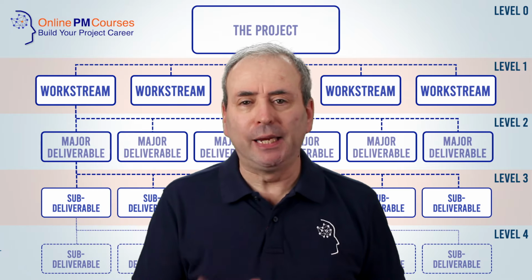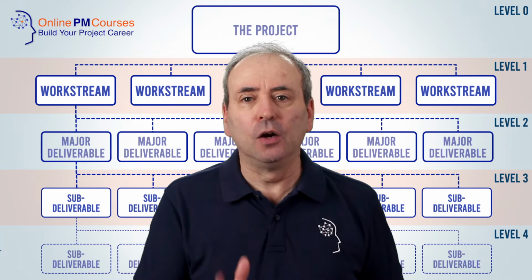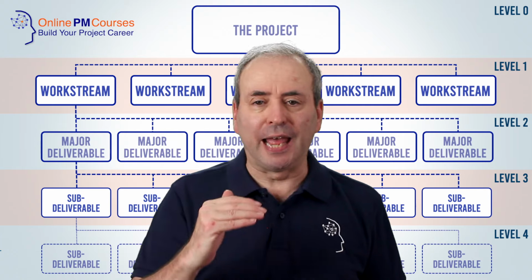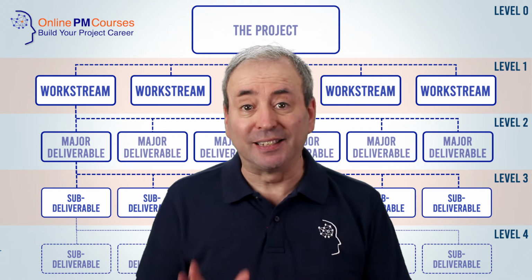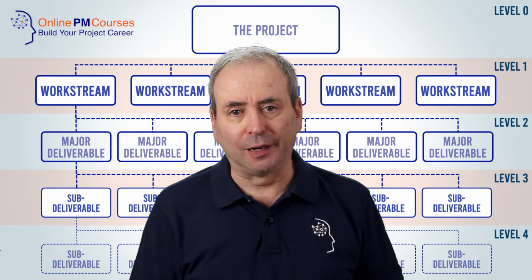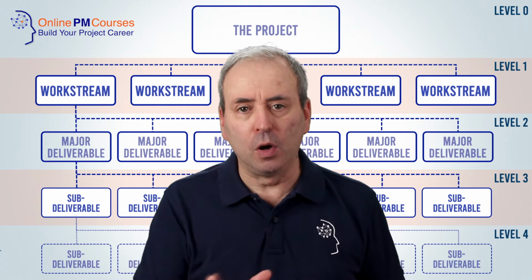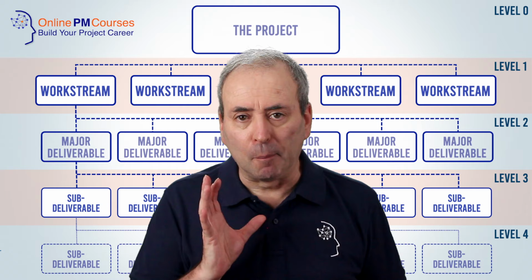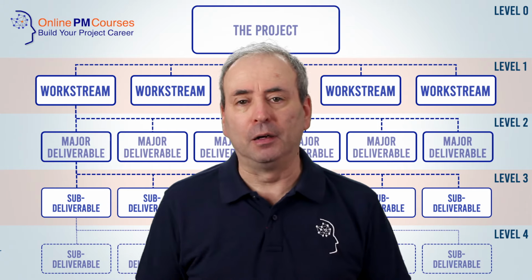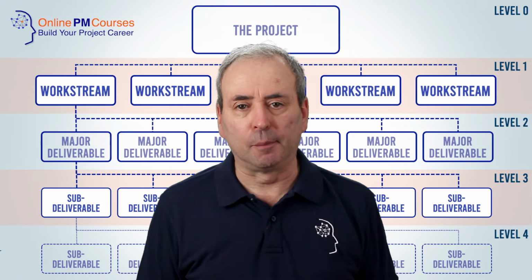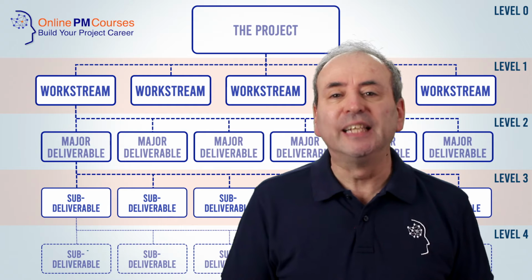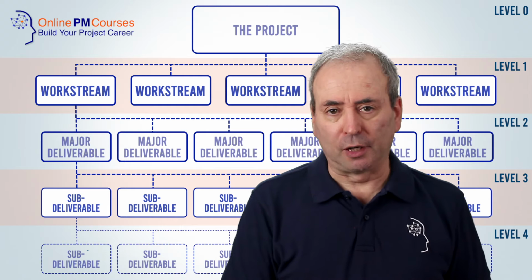And of course, it may not look tidy, but it is okay to go to different depths, different numbers of levels at different parts of the work breakdown structure, because your work breakdown structure should be determined by the work that needs to be done, not by some platonic ideal of a perfect, neat work breakdown structure. The next thing to do is to document your work breakdown structure.